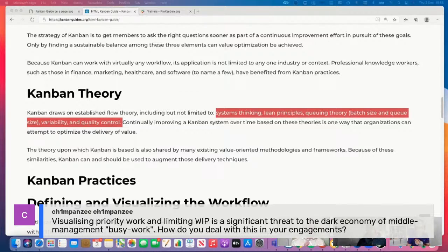What I love to do during the Twig simulation is that you're rewarded when you run your Monte Carlo forecast several times during the simulation. You can see that those managers were anxious at the start because all that stuff is still in the options pool, and you haven't brought it in, and we need to get it finished and all this kind of stuff. Then you show that when they actually limit work in progress, when they control their WIP, their Monte Carlo is rewarding them with better forecasts. So what I say to people is, yeah, there'll be a bit of anxiety at the start, but you will be rewarded. There is a bit of a lag before you see that coming in, but that's when the pressure comes off.